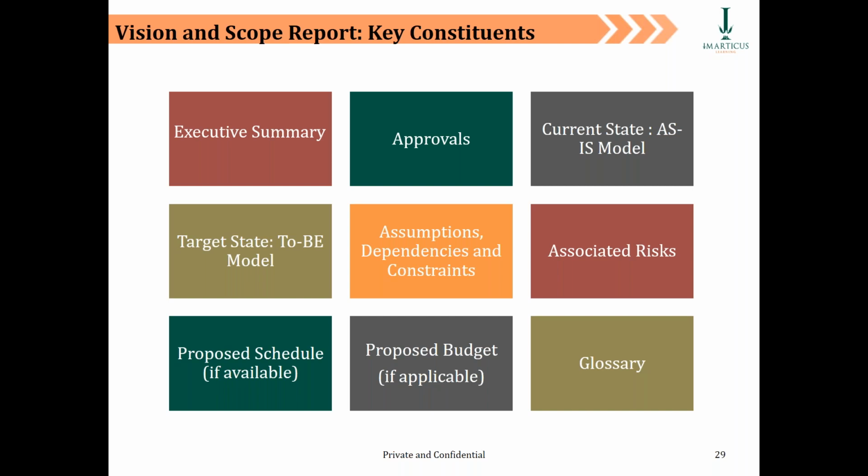In short, BRD. But towards the beginning part of the project, let's say you've done about 30 to 40% of the timeline, you have a deliverable called the vision and scope report. That is something which you have to give to the client as an initial understanding of the project that you're going to do.